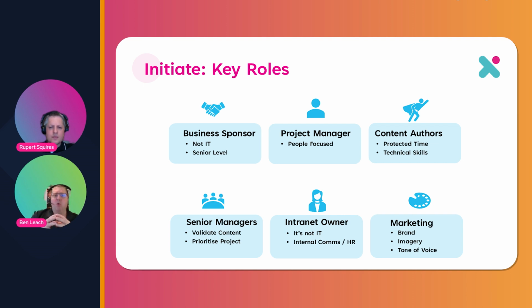Now, our most important role, to be honest, is those content authors. They're the people that are going to feel the biggest brunt of this initial impact in terms of what they have to do. They will need time set aside alongside their day jobs to actually focus on putting content together, ideally if they can be seconded for a period of time, for instance, and they will need a level of technical skills, not extensive technical skills, but they will need to be reasonably IT savvy in terms of creating content and be able to use these types of web publishing tools.